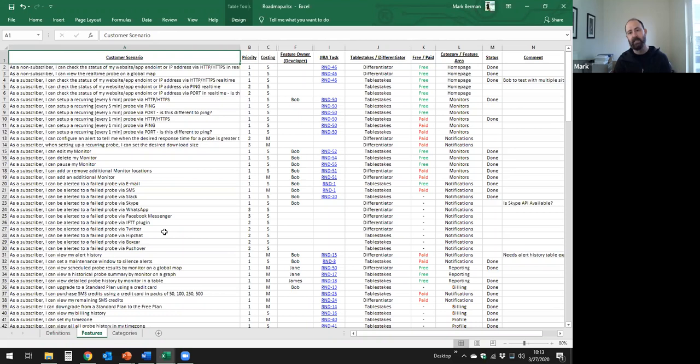And then ultimately, what I do is once I have a very well-defined list and internal priorities, I then create a survey that I share with my customers. It doesn't have this level of detail, but it has some of the core concepts. Get feedback on that, influence my prioritization. I then add an additional column which talks about customer priorities. And then there's a conversation internally to try to reconcile.